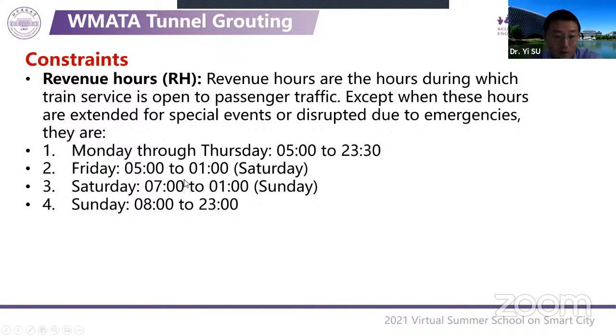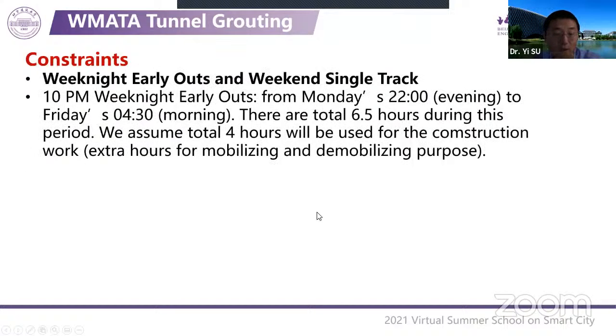So within this period, you cannot do a lot of construction work. So the solution is WMATA makes weeknight early outs and weekend single track calendars for those construction works.